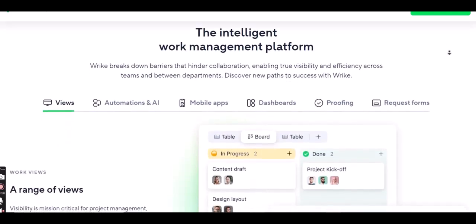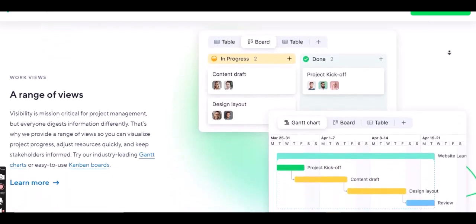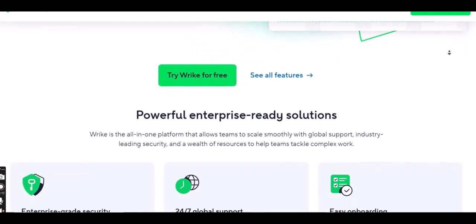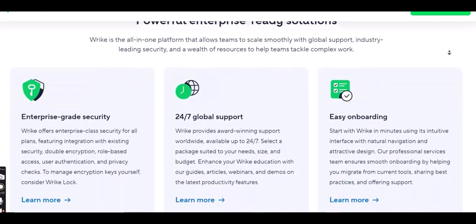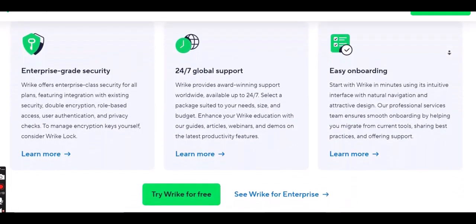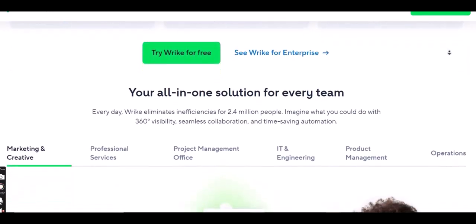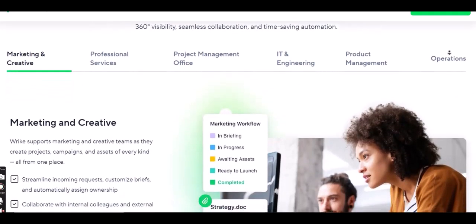Step 5. Choose what you want to report on based on. Under the Based On section, you'll tell Wrike the primary item type your report should focus on. Common options include tasks and sub-items. This is most common for tracking individual pieces of work. Projects, useful for high-level project status or portfolio reporting. Time entries, essential for understanding time spent, billable hours, or comparing estimated versus actual time. Your selection here will determine what fields are available for grouping and filtering later on.